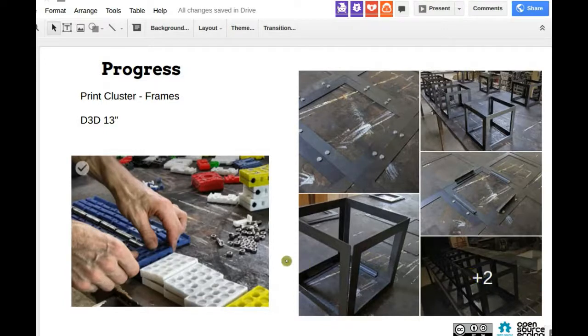That means a lot of printing of parts. It takes about a full day to print one set of parts, like 24 hours. So it's really like 1 or 2 days. So thinking about 24 printers, we would need 24 days of printing nonstop with a single printer, or if you have multiple printers, you divide that accordingly. What we're going to have is 10 printers, so it would take only a few days to print all the parts, so that would be really good.